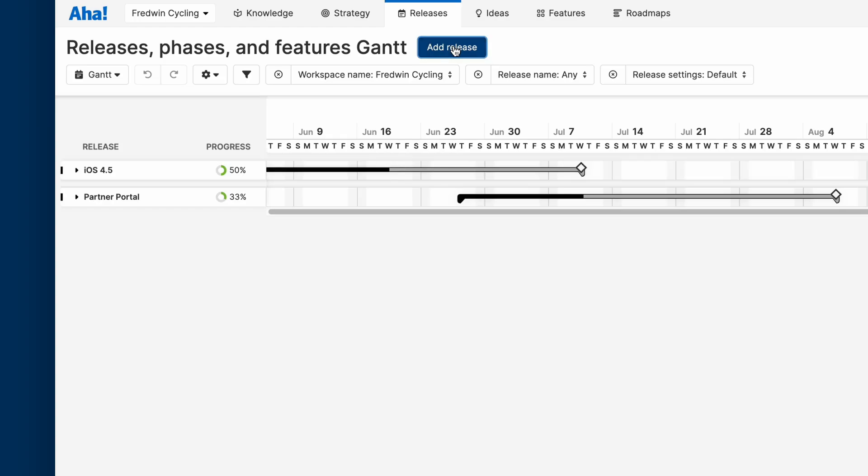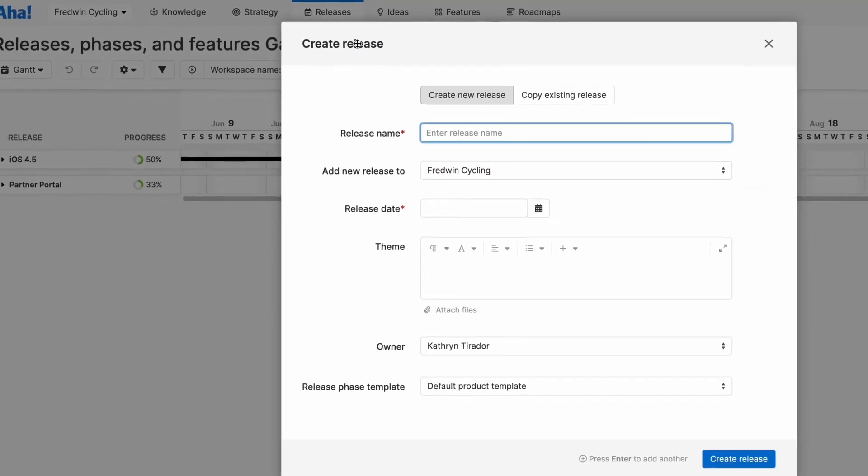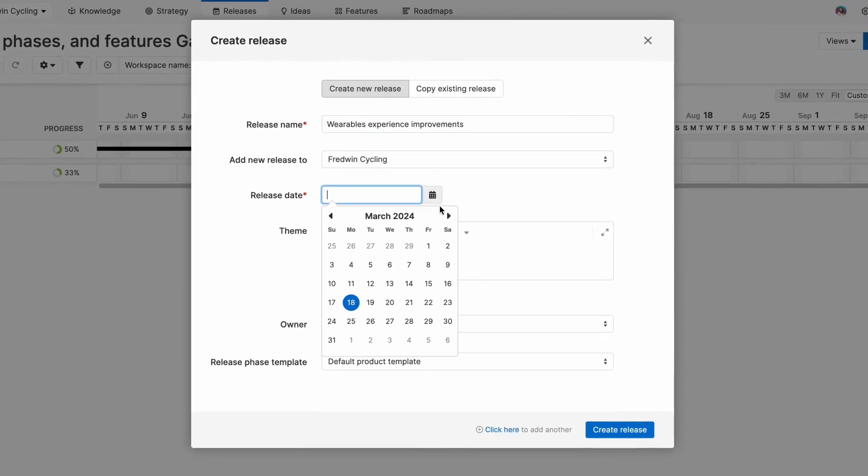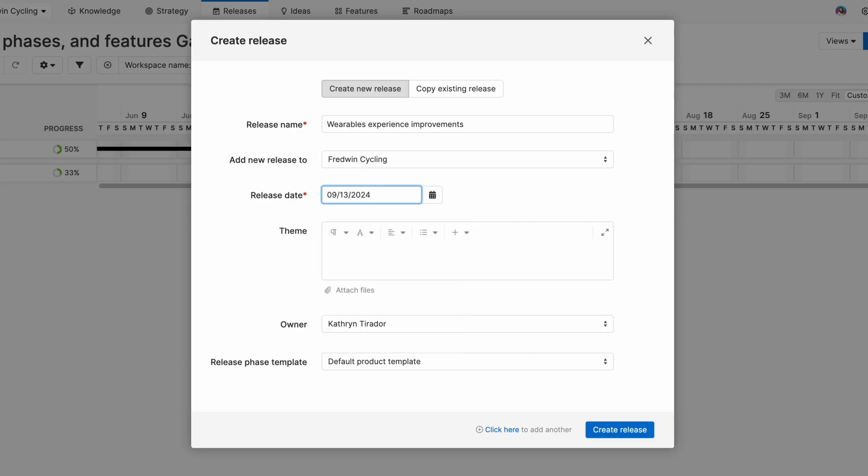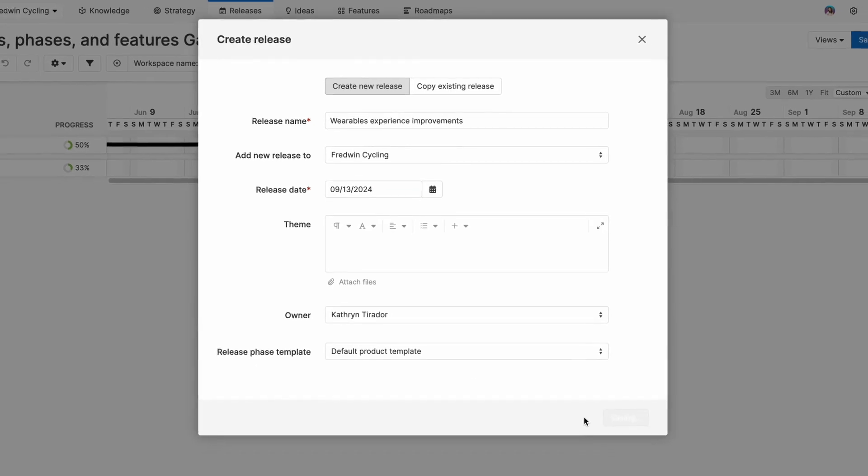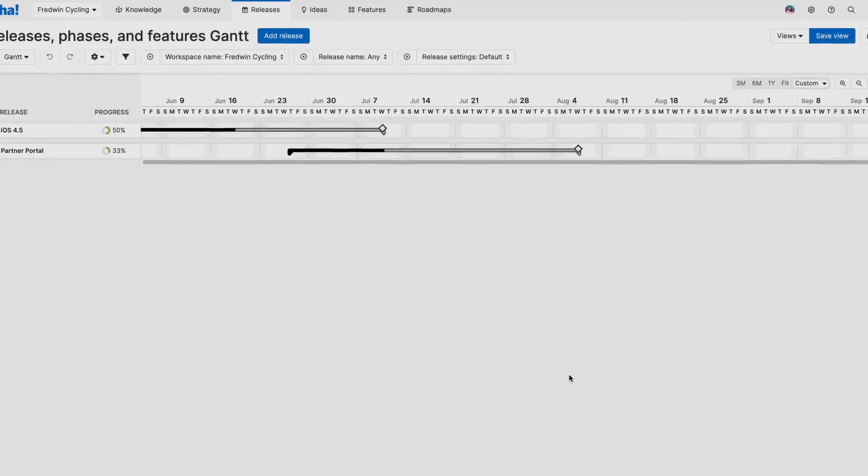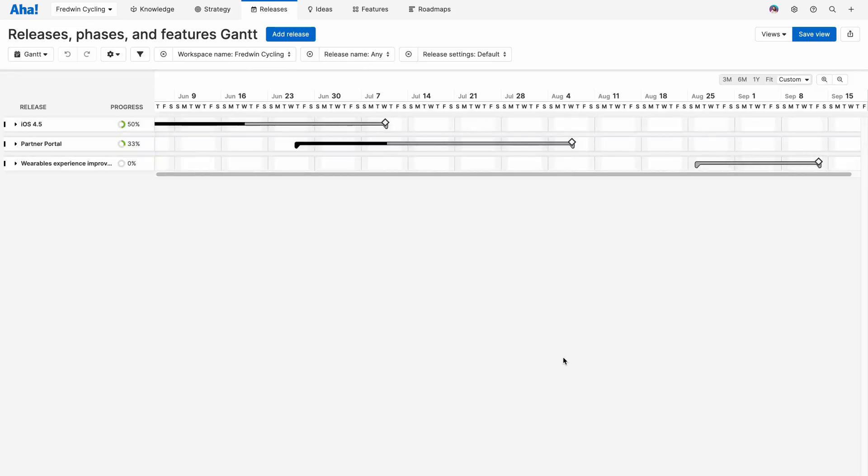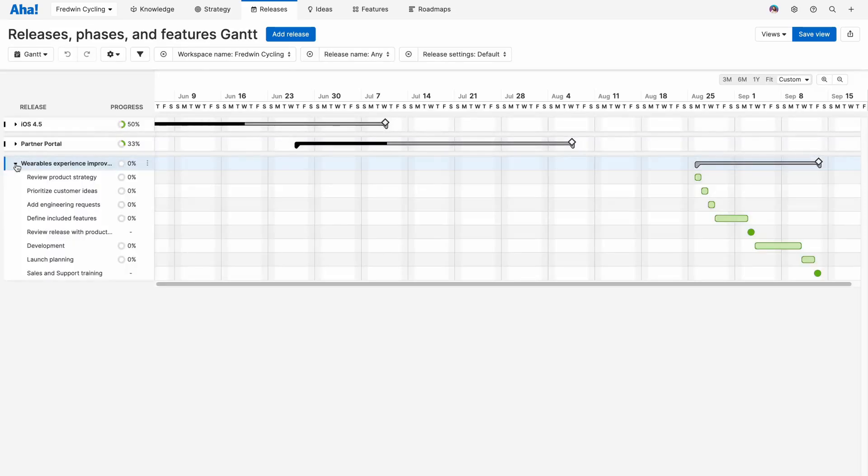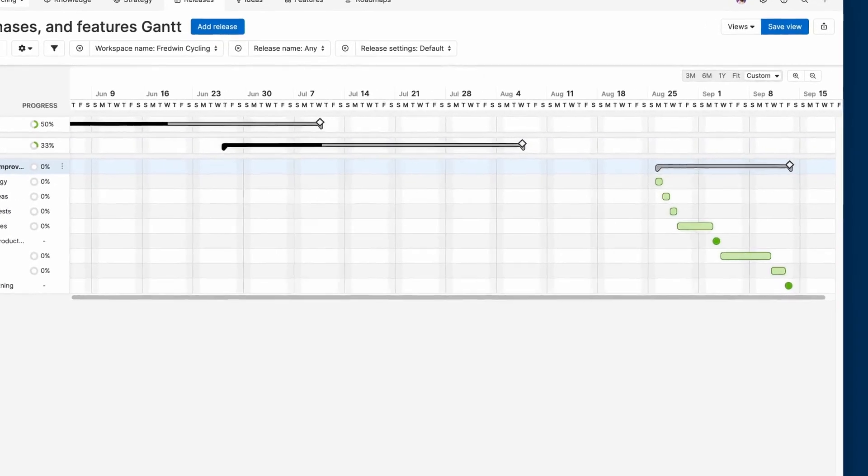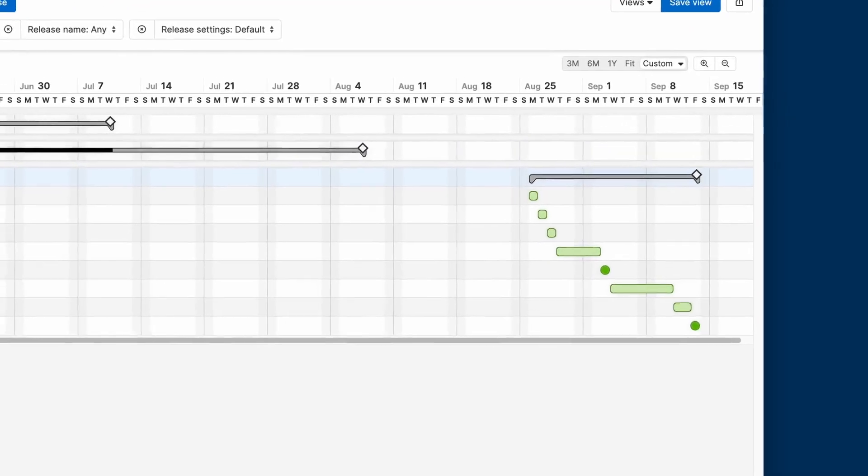Let's add a new release. We'll give it a name, a target release date, and we'll use our default product template, which will give us key phases and milestones that are essential to a successful launch. Now we see our release appear on our Gantt chart. And when we expand it, we see those key phases and milestones.